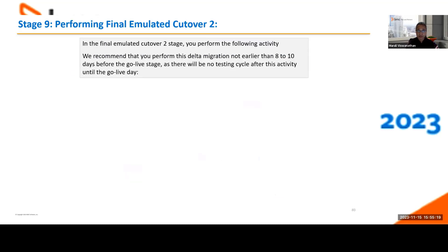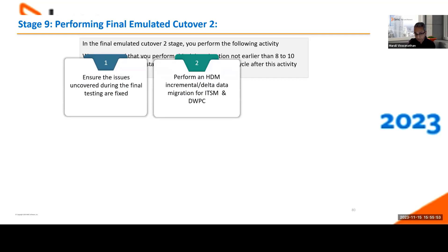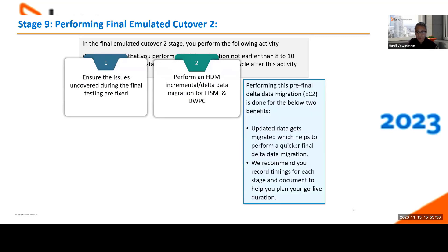The simulated cutover — stage nine — should be done eight to ten days before go-live to reduce the amount of data coming in at go-live, shortening the final data migration window. Ensure any issues uncovered during final testing are fixed. Perform a delta migration directly to your production from your staged database. This gives you a quicker final migration on go-live day. We strongly recommend these exact steps be timed, as they are the same steps you will practice on go-live. After completing, take golden backup three again (overriding it). Once this migration is complete, set your production to admin-only mode — you're nearly ready for go-live.